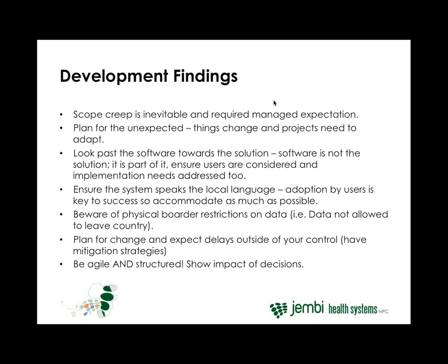Coming really down into the technical side of that for any groups working in software development, and I'm sure this is something that many have found, but interesting to illustrate, is that scope creep is inevitable in an iterative and implementation-driven approach. You don't know what you don't know, and often with a vast system, taking the time required to do all the requirements gathering would give you everything you need, but by the time you start to implement it, you often find that those requirements are dated, and the latest technologies and tools have come out that better allow it to be done a different way.